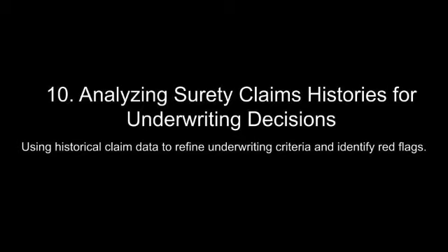The legal landscape surrounding surety claims is complex, involving contract law, statutory regulations, and case law precedents. Jurisdictions may have specific statutes governing surety bonds, such as the Miller Act in the United States, which mandates performance and payment bonds for federal construction projects. Legal interpretations of contract clauses, obligations, and defenses in claims are continually evolving, necessitating ongoing legal expertise and adaptation.